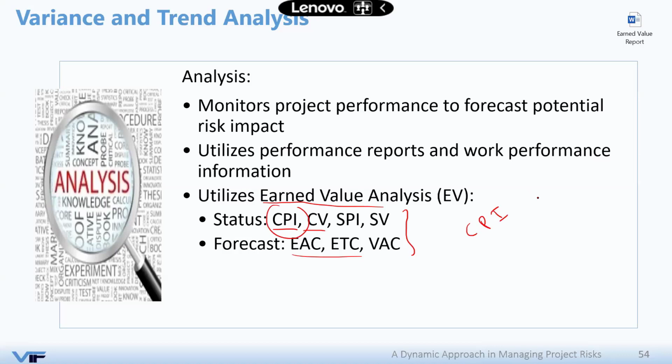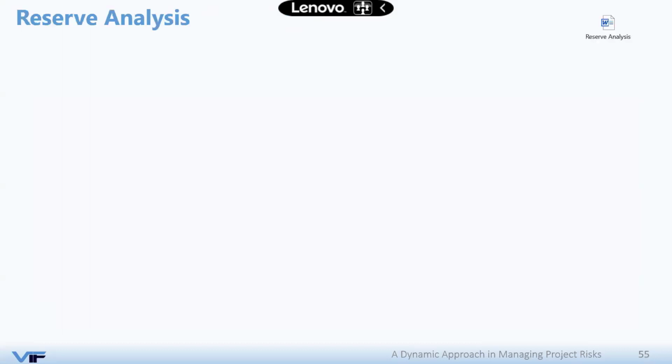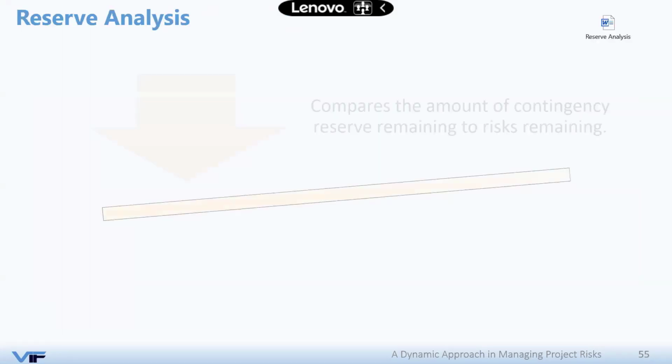Our reference point for it is it should equal 1. If, however, it increases more than 1 or decreases more than 1 by a certain limit, either by 10% or decreases by 10%, that will alert us that there is a risk that we will not be on budget, because cost performance index can tell you if you are going to be over or under your budget. So the idea is you need to develop KPIs. There are standards about risk KPIs in most risk libraries and PMO libraries, and you can adopt many of them.